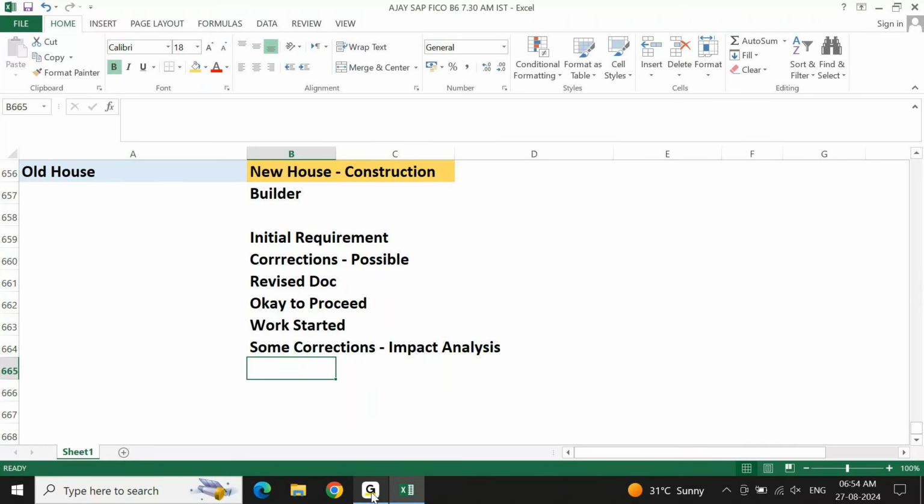To increase the room size, I may have to move a pillar. Now, is it practically possible for me to move the pillar? I can move it. If that is your strong will and determination, I will move it. I have to demolish the existing pillar. I can put another, but it will increase your cost or not? Yes. It is increasing your cost. Now, when I say okay, I will do it, but this will cost this amount, I have to scrap the work whatever is done.